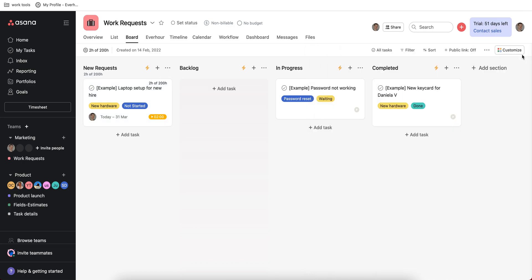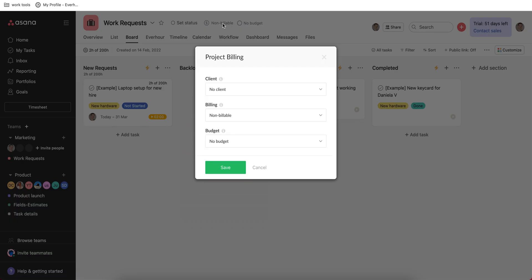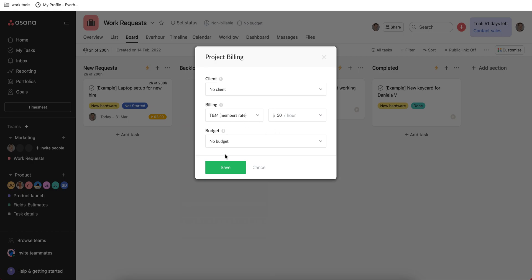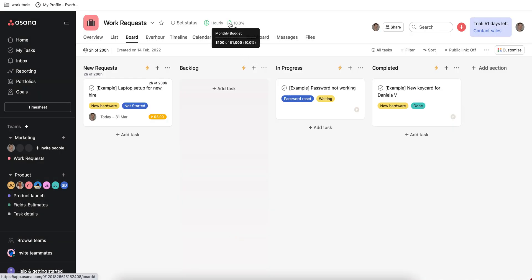When you view the project on the main board you can see these two labels which allow you to set the billing and budget type. Then you can reset the budget and just keep tracking time based on user rates and control this budget.